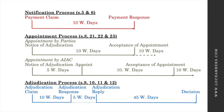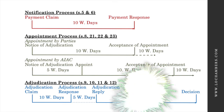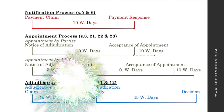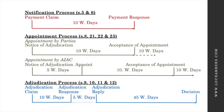The adjudicator will then deliver his or her decision within 45 working days upon receiving the adjudication response or adjudication reply, whichever is later. If no adjudication response is received, the 45 days shall run from the expiry of the prescribed period for the adjudication response, or as the parties agreed otherwise.